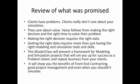So if you are tasked with delivering data for a decision that needs to be made on February 1st, and your model isn't ready until February 28th, it's no value. You've missed it. This brings in an important aspect, the time component, and it's very important to being successful to understand that time component and make sure that as you're managing your project, you are able to meet these time constraints.